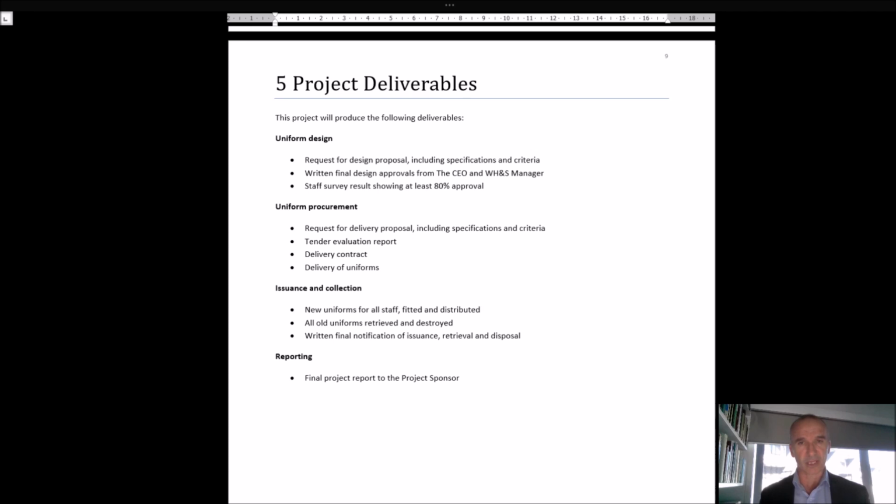What specifically will we deliver? And if one of those deliverables you think of is something like improved morale, which is really something non-tangible, if I was working one-on-one with you, I'd say let's try and get this into a tangible. What does improved morale bring the business? And we'd try and identify something like a decrease in absenteeism. So a tangible for us might be some type of report that demonstrates a drop in absenteeism over the period of our project, or post our project over a particular period. So I'd always encourage you as much as possible to stick to tangibles.